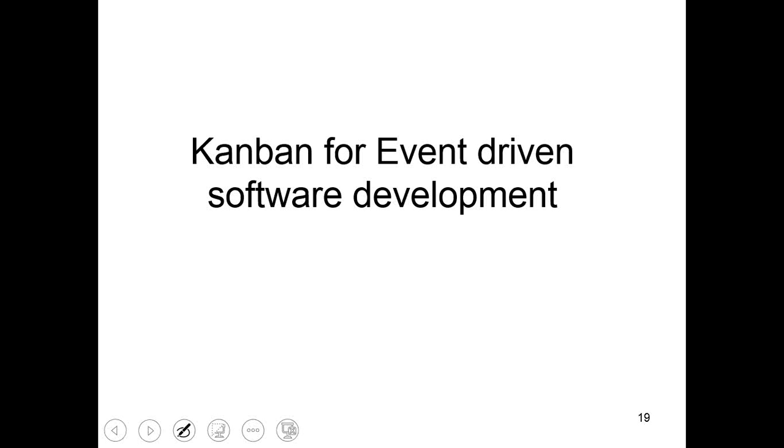That basically are the various steps involved in defining a Kanban flow in an organization. As I mentioned in the beginning, you don't have to introduce a new process. Whatever process you are following, you need to understand the value stream maps, and you can overlay the Kanban visual dashboard on top of it so that you will be able to understand the bottlenecks and remove them so that your flow is smooth.